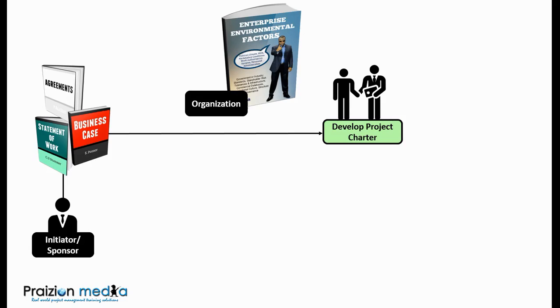For example, there are some projects that require an earned value management system, and the criteria is very specific. Now, if you don't have that PMIS, that earned value management system, which we will roll up under the PMIS umbrella, you can't work on the project. You will not be selected by the government to work on that project. So think about it like that.